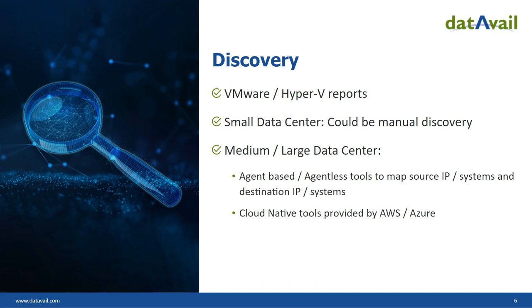So we talked about the discovery phase, and how discovery is done. A lot of customers already have VMware or Hyper-V, so within that software you are able to export the reports. If it's a small data center, 10, 20 servers, you can possibly do some kind of mapping manually. But in a large data center, sometimes the customer doesn't have application to database mapping and dependency mapping, all those aspects that you need for cloud migration.